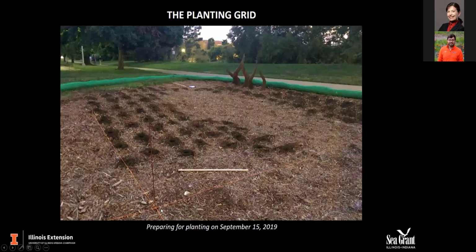I really appreciate the question because it's one that I struggled with myself, and therefore it is a great lesson learned. It's a little bit difficult to explain, but instead of doing all of the ground covers in just this square at one time, we basically did everything at once, but broken down into more manageable 20 by 20 squares, which made it easier for us to navigate in and around these spaces as we planted the dense planting. I hope that gives you somewhat of an answer.